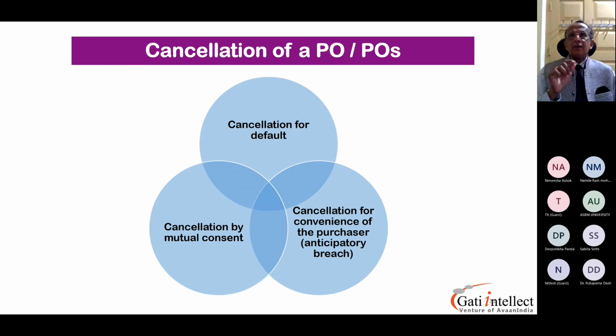Now on this subject, let me move a little deeper. What is said by the court also is that you should not keep accepting the excuses given by the supplier. If you keep on accepting these excuses, you lose the chance of enforcing.